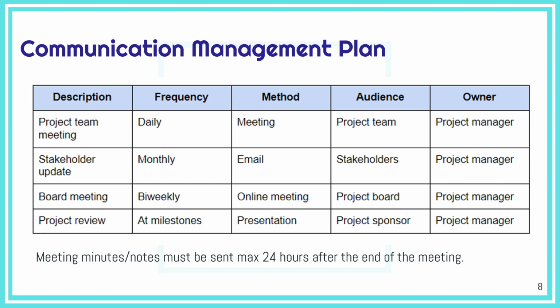Then we started one of the... sorry, and for the communication management plan, we also said that it's very important to send the meeting minutes, as a project manager, no later than 24 hours after the end of the meeting. Then, we started the conflict resolution.